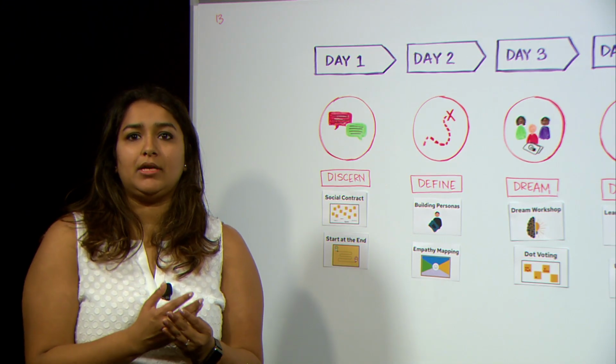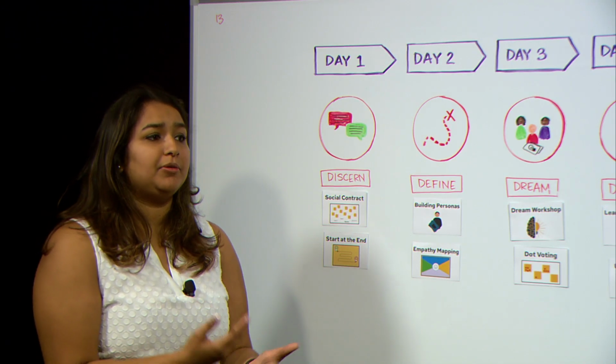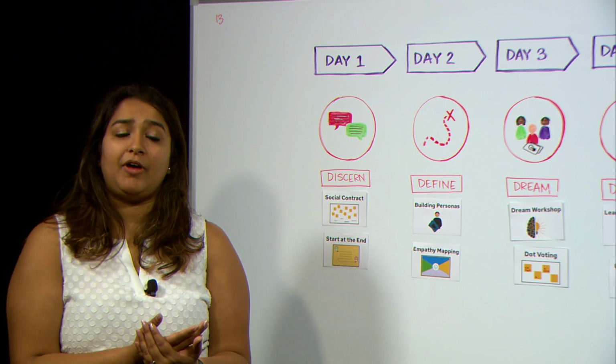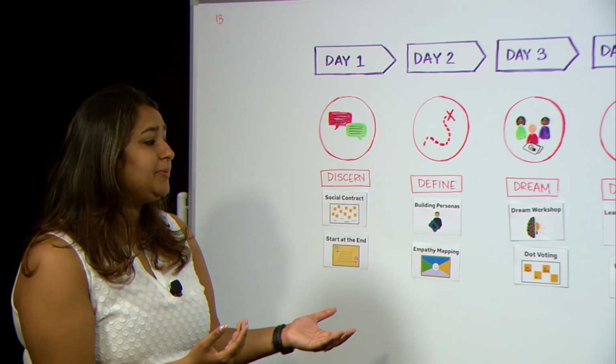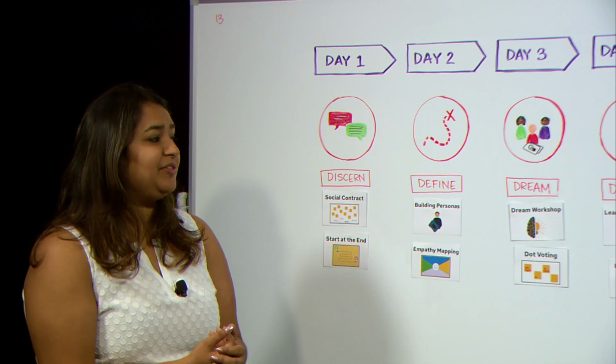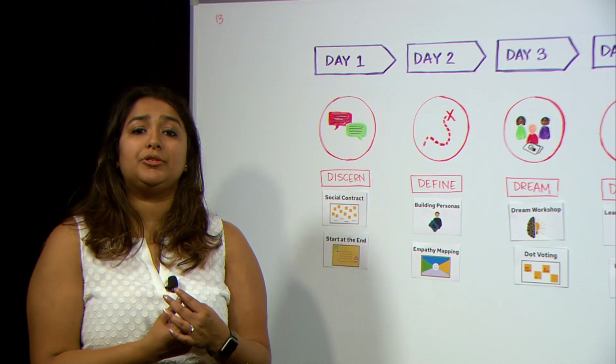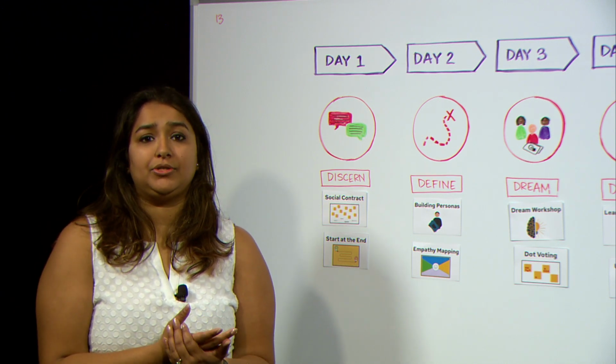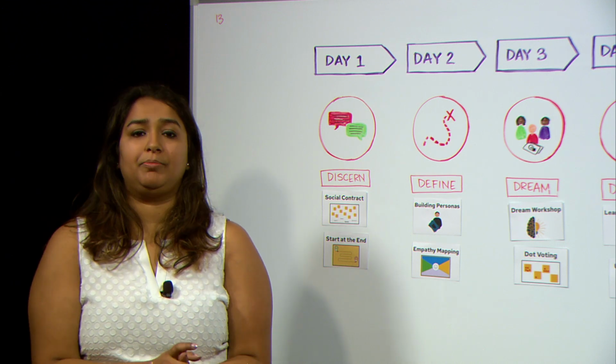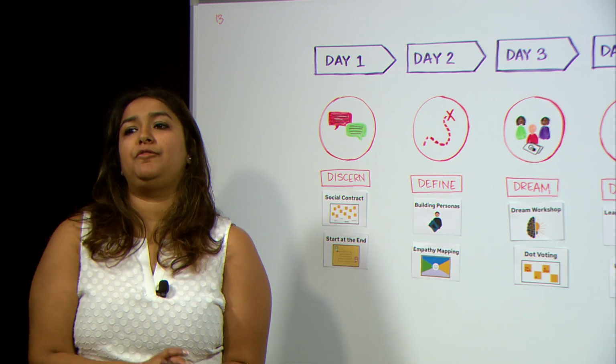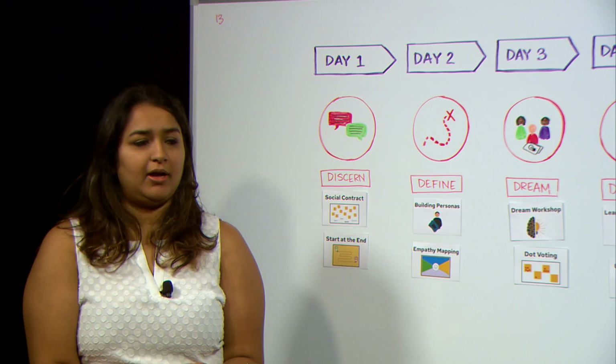We spend a lot of time with our product owner to prioritize and establish what our minimum viable product is going to be. We use a practice called value slicing that gives us an opportunity to understand what our major goals are and how we're going to approach it, and build our first iteration of a product backlog.